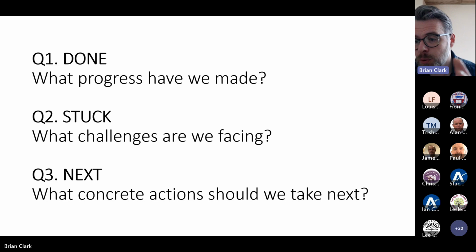And what it lets you do at those points is say, well, we can see there's a problem here, so let's slightly change direction because of what you've said there. And by making the stand-up process a timetabled formal part of that improvement cycle, it lets everyone be accountable, but also lets everyone celebrate more frequently and together. So for example, if your improvement cycle is 8 weeks, you might put in a stand-up at week 2 and a stand-up at week 5 to catch up with those things.